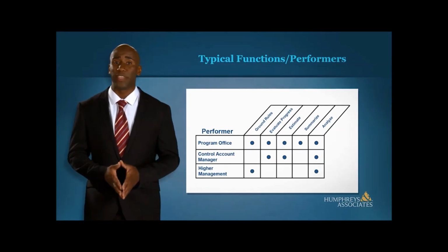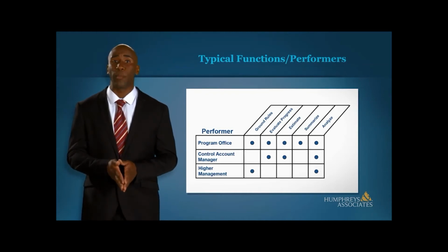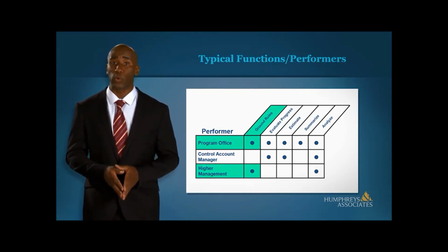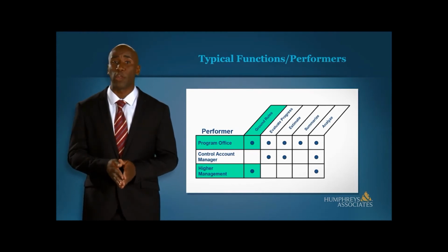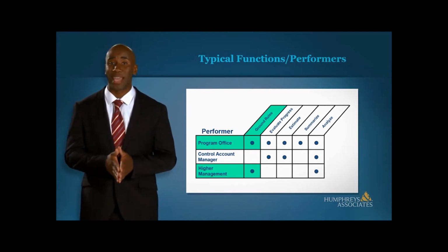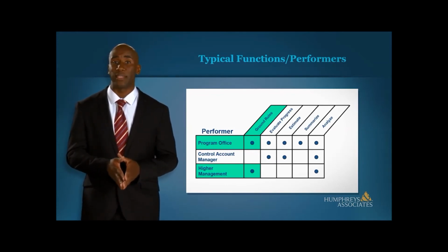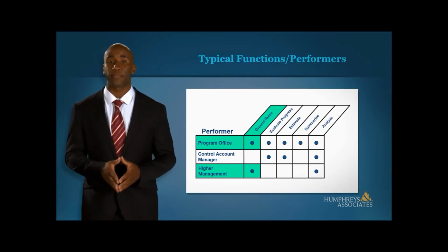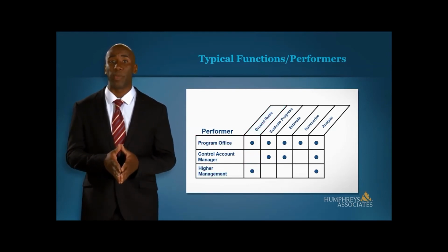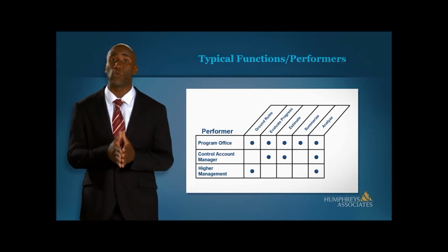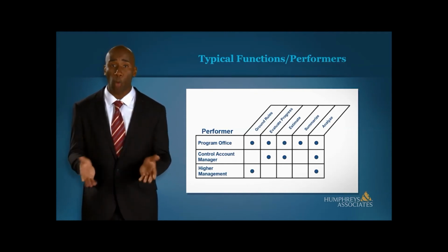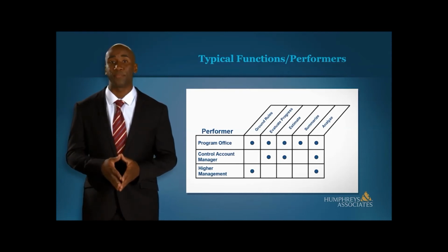One of the reasons a comprehensive EAC is more complex than a monthly assessment is because it is a bottoms-up estimate of the work remaining to be performed. Ground rules are established to ensure that all participants prepare their estimates based on the same project status. For example, definition is made for the start month for the EAC, schedules to be used, risk assumptions, subcontractor EAC updates, due dates, etc. The comprehensive EAC should be prepared with the most recently approved forecast schedule so that all participants are estimating against the same plan.